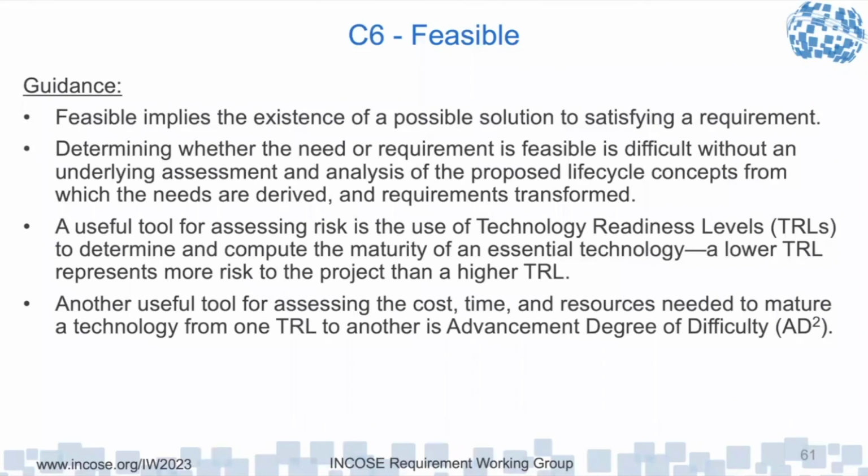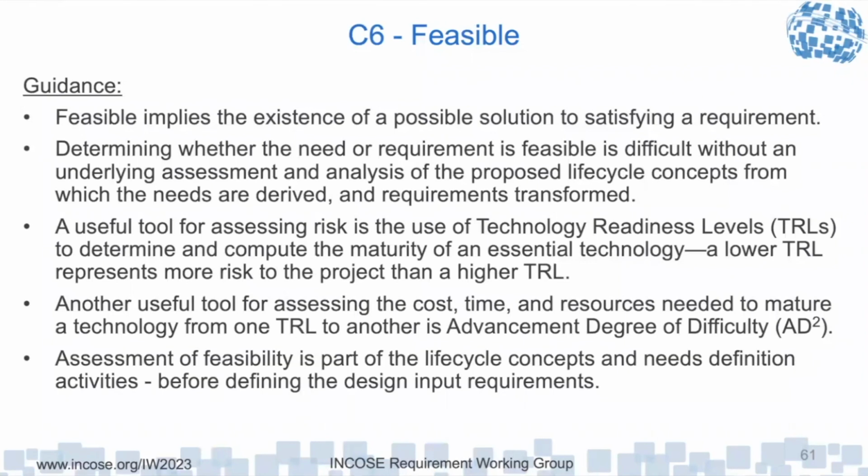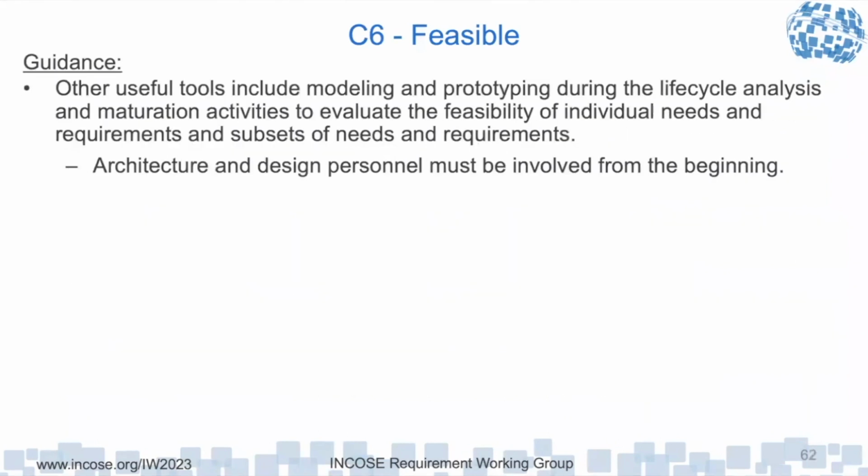Yeah, I've seen a few papers on that. Assessment of feasibility is part of life cycle concepts and needs definition activities before defining the design requirements. If your needs aren't feasible, your requirements that transform them aren't going to be feasible, so we need to address that early. Other useful tools include modeling and prototyping. You can build a model of something, and I'm not talking about a system model, or build a prototype.